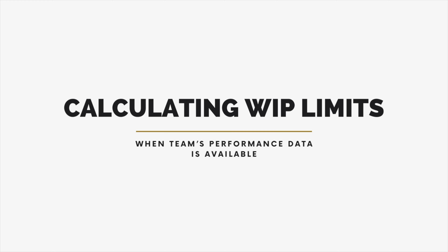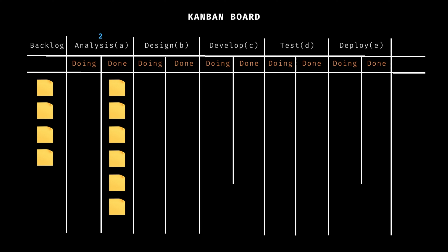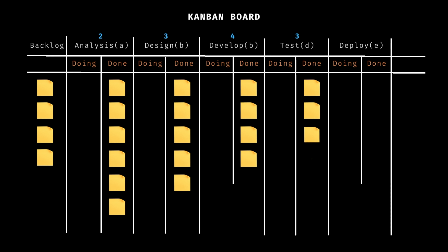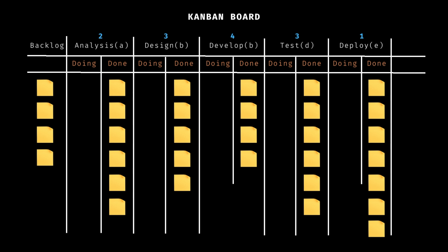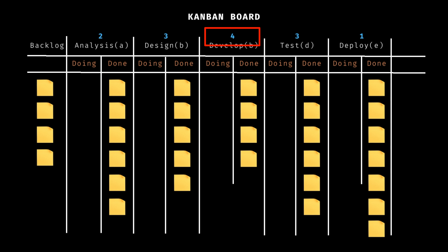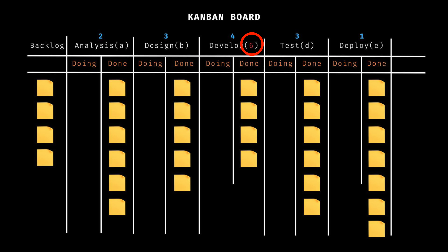Calculating WIP limits when we have data on the team's performance available. Let's say the analysis column receives six items per month with two people working on it, design gets five items with three people, development gets four items with four people, test gets six items with three people, and deployment gets seven items with one person. It's clear that the development column is the slowest — it has the most people working on it and delivers the fewest items. With the slowest column being development, and four developers working on it, we set the WIP limit for that column equal to the number of people plus a 50% buffer. With four developers, the WIP limit for the development column would be six. This is our first WIP limit, which will serve as a baseline for all other WIP limits.